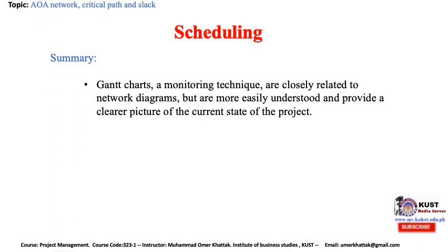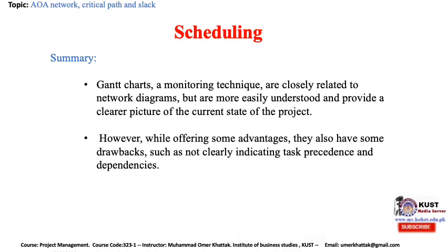Gantt charts, a monitoring technique, are closely related to network diagrams, but are more easily understood and provide a clearer picture of the current state of the project. However, while offering some advantages, they also have some drawbacks, such as not clearly indicating task precedence and dependencies.